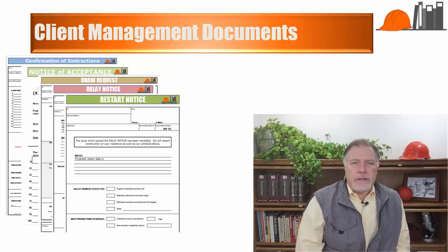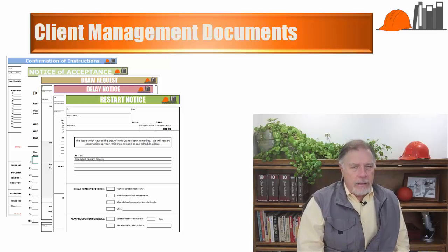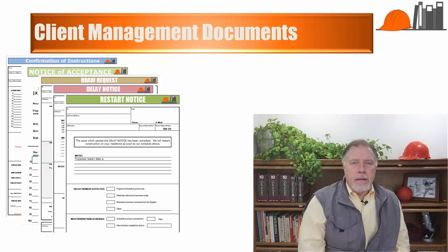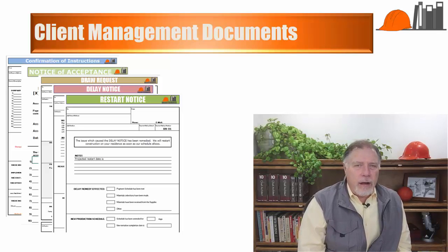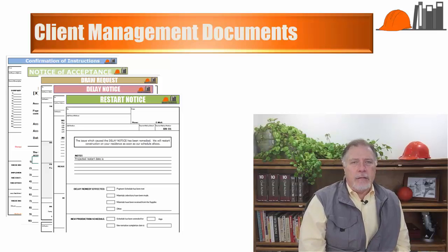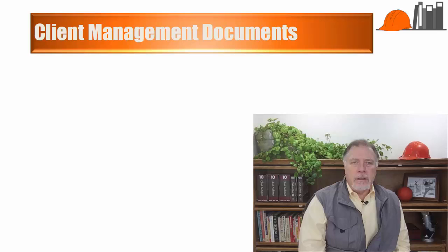Client management documents, along with your contract package, provide you with the opportunity to carefully and precisely predefine your responsibilities with regard to the work that you'll be doing for a client. Establishing up front that the construction of a custom residence is a joint effort between the builder and the client is an important step. By instructing the client where their obligations and responsibilities lie in the building process, you'll be in a more defensible position when the inevitable misunderstandings arise with your buyers.